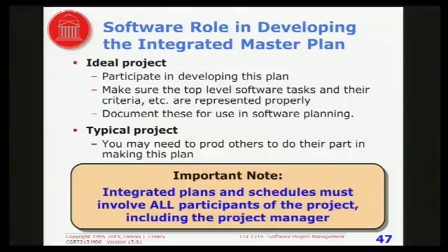But the reason I bring this up is because if the project manager wanted it done in 6 months, and after developing this plan, you say we can do it in 9 months, and everybody agrees to it, then you can't say it's a risk that the software manager or the project manager wants it in 6 months. This project manager has already agreed that it's going to take 9 months at this point. So your integrated master plan is kind of your starting point.